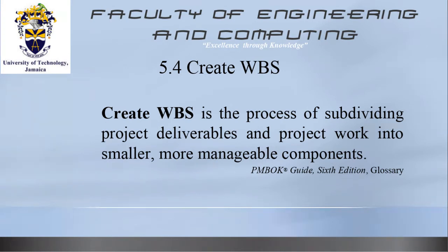Now, we still will break down this huge project into more manageable components. And a simple way to break it down is, okay, we are going to have a strike force do the excavation for the foundation, do all the steel work, pour all the concrete, and take us out of the foundation. Then we are going to level off so everybody can see how big the building is going to look by virtue of the foundation being poured and everything is now coming up from out of the ground. So that is the first part. Then we are going to erect the superstructure. That is the next bit that we are going to do.